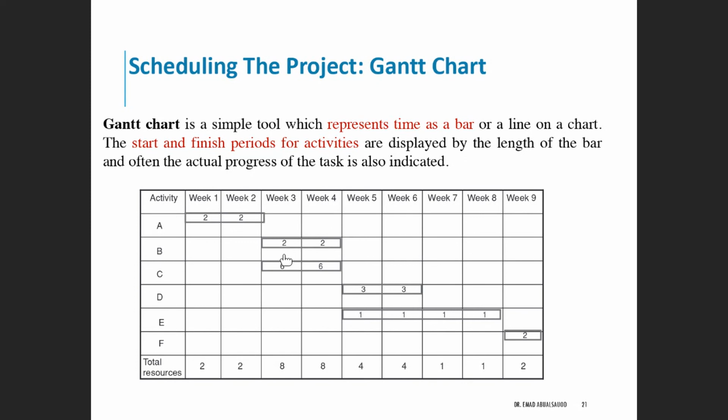So you can see the timeline for all the activities and sub-activities of your project in one chart, so you can track it and monitor the progress, and you can change the color of the bars based on the progress level. For example, red is not started, yellow is in progress, green means completed. You can change how it's represented. The concept is the same. Then there is a wide range of ways the Gantt chart could appear and how more information can be added to it.